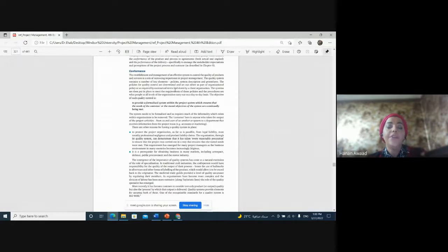Do we have certain procedures? For example, approval for design. So the engineer or the engineering team will work on the design. There are certain elements. There should be a committee to evaluate the design. Any change in the design should be approved by the department head. So this is a procedure. Also, they could be mandated by the government. You cannot work on a design unless you get a permit.